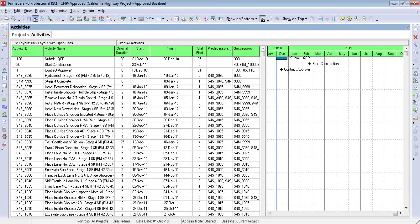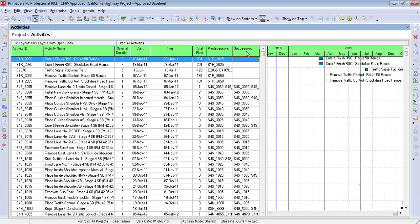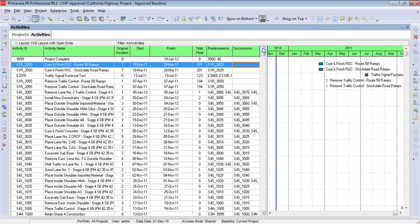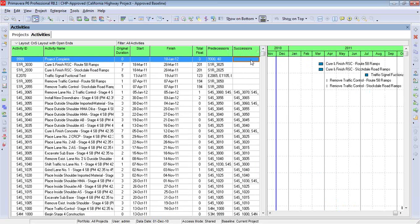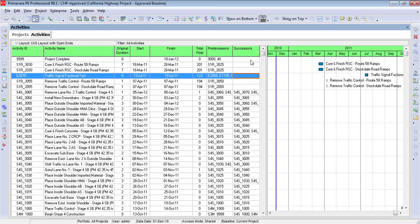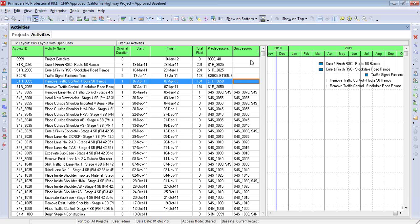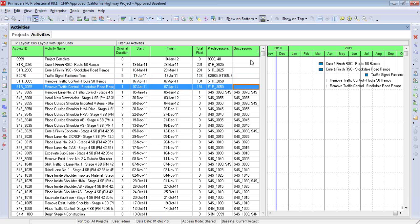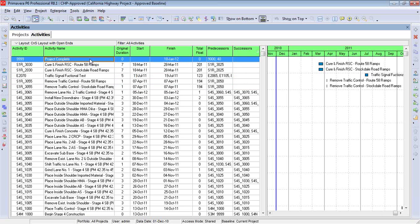I'll check successors the same way. We'll come in here, click on this one, push the blank values to the top of the screen. And you'll see that we've got one, two, three, four, five, six activities that are missing successors. One activity should have an open end. That would be something like this, project completion. So I have five activities that are missing logic.